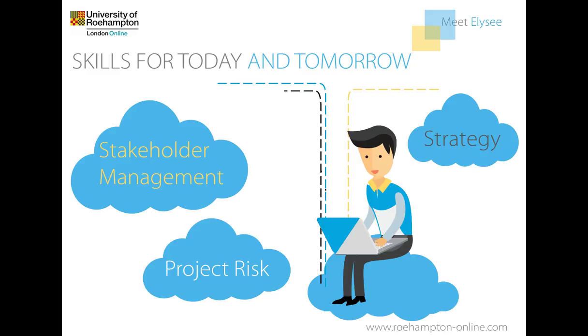And this is exactly what I have to do in my daily work. When I'm implementing a project, I have to identify my stakeholders. Let's say on a justice support project, who are my stakeholders? Let's say Ministry of Justice team, staff, and police, and community members. I have to identify them and see exactly what their expectations are from the project. And this will help me at the end of the project or in the middle of the project to measure if the project was a success.